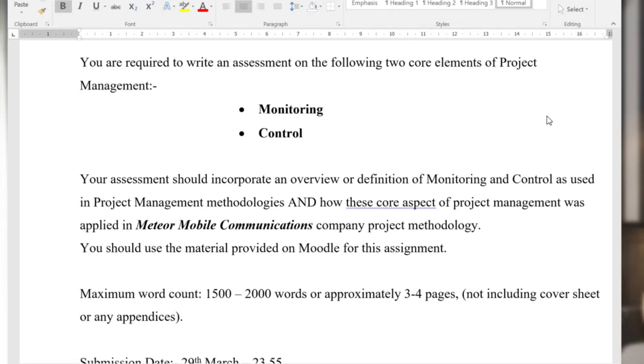So a milestone 4 might be the meeting title or phase. And we say, have we got all of the requirements identified? Have we got everything planned, or reasonable detail of planning and costs and time and schedule? And say yes, yes, yes. They're the exit criteria. So be careful of that one. Just watch that you have the exit criteria. So when you tick the boxes, it's a checklist, literally, these exit criteria.